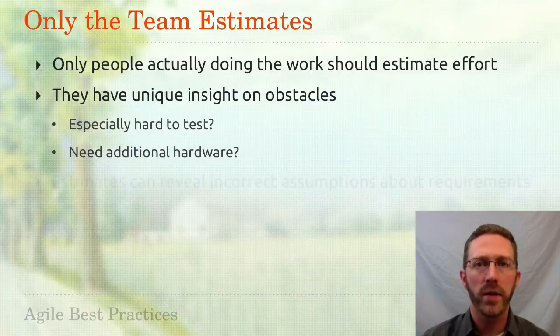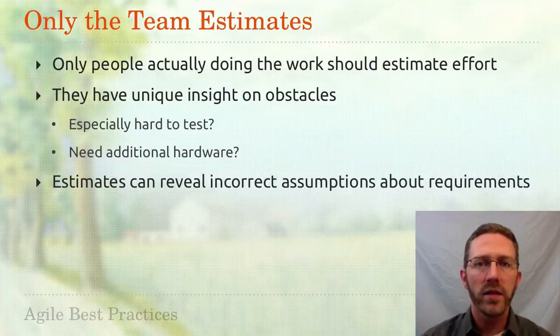And yes, sometimes their estimates will be excessively high. This is why the product owner should be on hand during the estimation. If incorrect assumptions have been made about the depth of the requirements, they can clear up that sort of misunderstanding then.